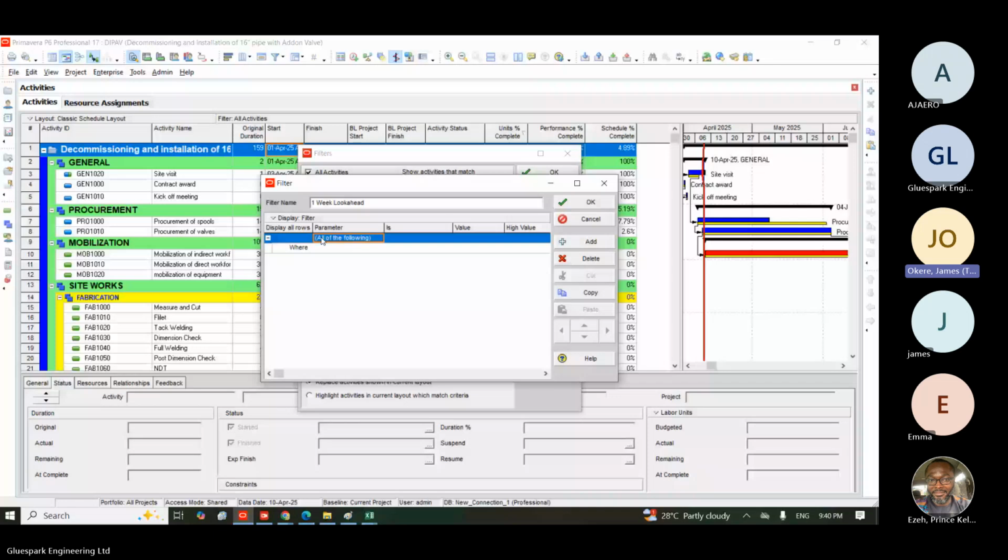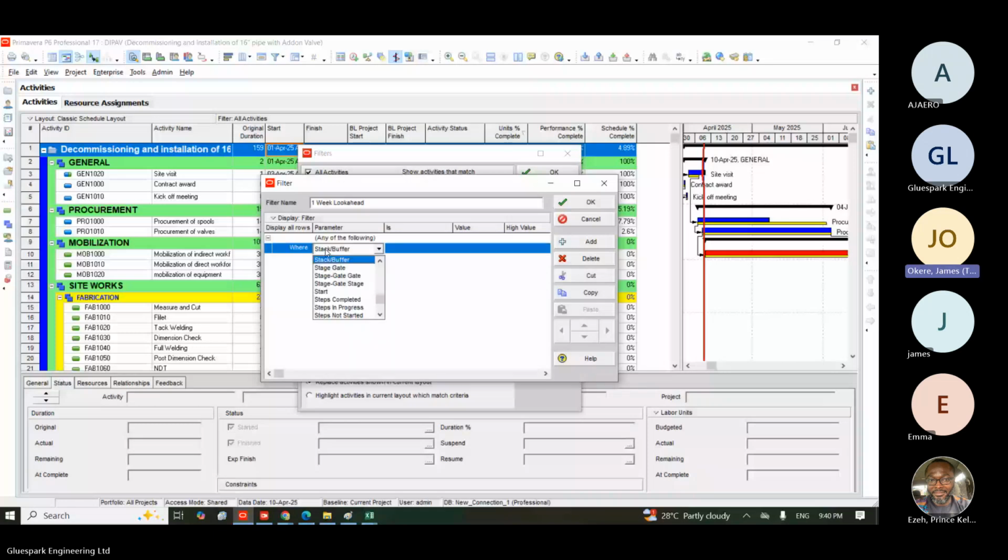Okay, so I will select any under the first site. Then under here, I will click where I will say start, where start date is within range. There's what is called DD. DD means data date, earliest data date. Then I will say the same DD. I will click inside there and put plus. Don't give space. Plus 1 week. W means week.